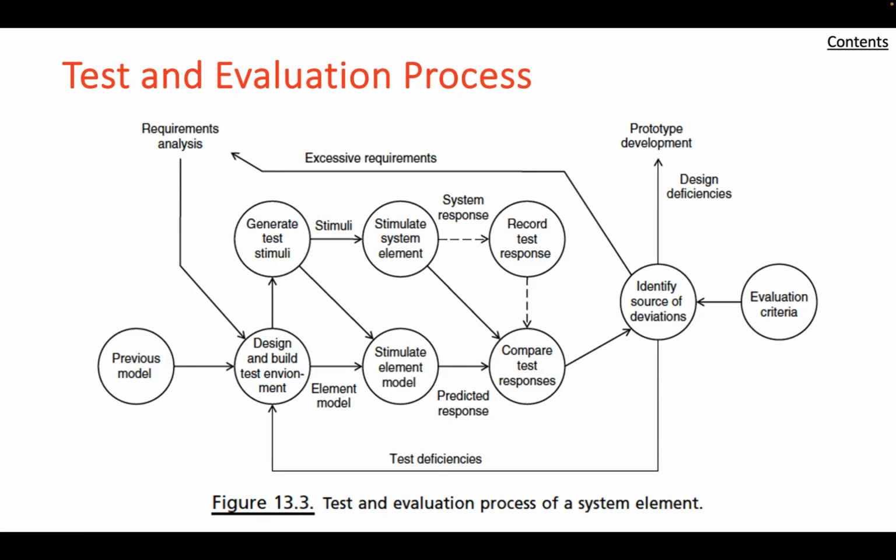Let's take a little bit of a thought about test prioritization. The test planning process is often conducted under considerable stress because of time and cost constraints. These restrictions call for a strict prioritization of test schedule and test equipment to allocate the availability, time, and resources in the most effective manner.